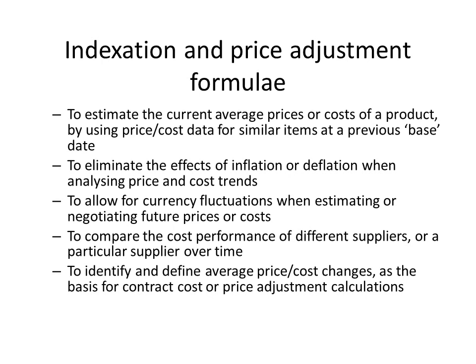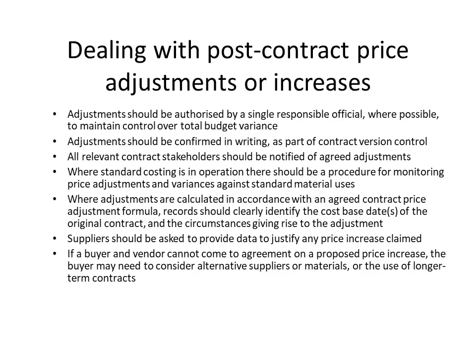So this is what we're trying to do. We're trying to come up with a fair price. It's not to adjust the prices for where they are at the end of the contract, but more on the average prices that the supplier would have incurred throughout the contract for labour and materials. So hence why we're talking about particular dates or average prices.